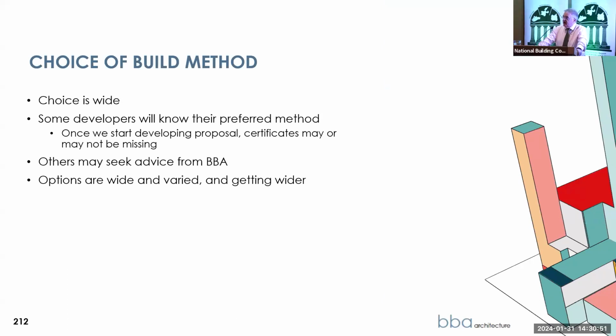The issues there are lead-in times and availability of material. The lead-in time on timber frame is maybe 16 weeks, and they have to pay 50% up front as a deposit. If they go with traditional, the issue is getting labour, getting block layers. Or if they go with ICF, they're more in control. But it still is a process that, as we heard this morning from Mike, we're maybe still learning the finer details of.